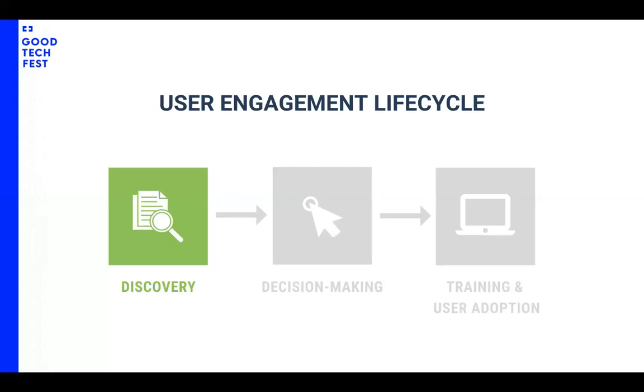So I would like to start by emphasizing two main lessons that we've learned through this. And the first one is that the discovery process is absolutely critical. Any organization looking to develop a database management system solution really needs to do a thorough analysis internally. And I repeat, don't skip this step, because you need to be very clear on what you need to achieve. And you need to ask yourself questions around, what challenges are you facing? What has been working for you? What are your biggest pain points? And you need to be as specific as possible.